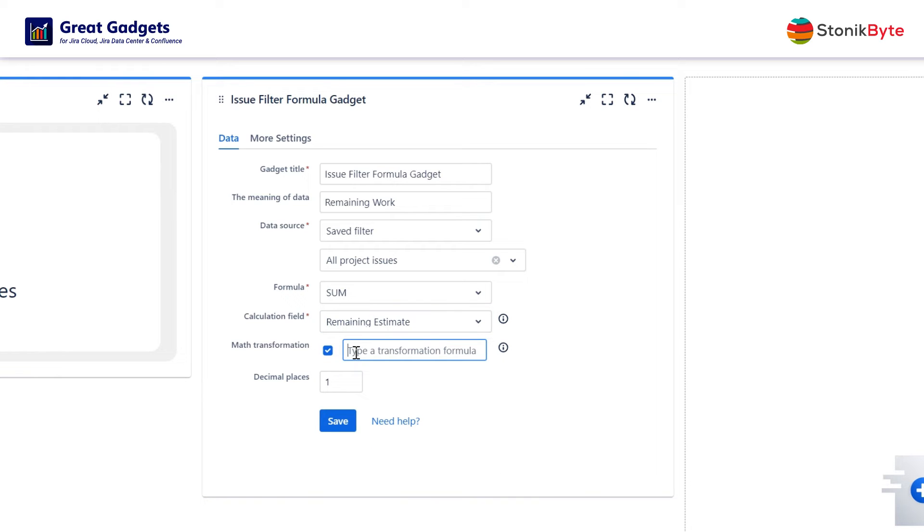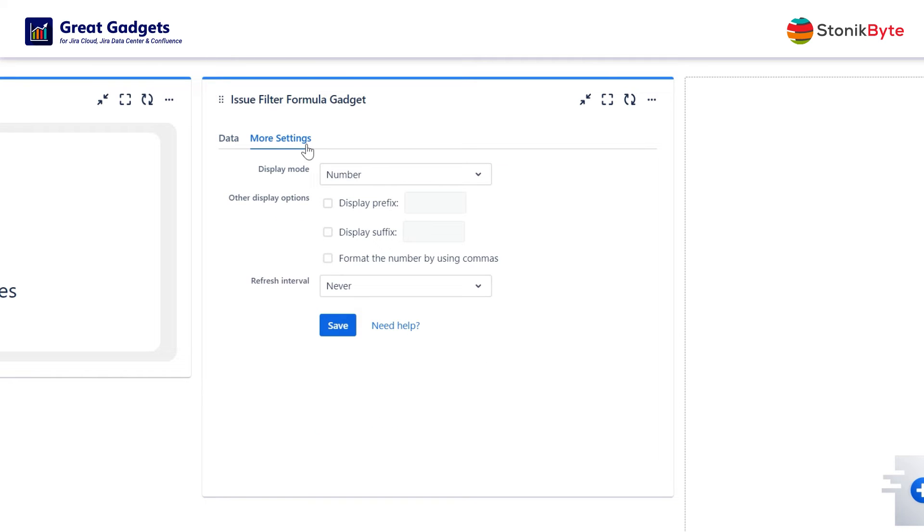Because Jira stores the value of the time fields in seconds, you'll need to apply a math transformation to convert the formula results in hours. Set the suffix representing the unit of measure and you'll have the value displayed on the dashboard.